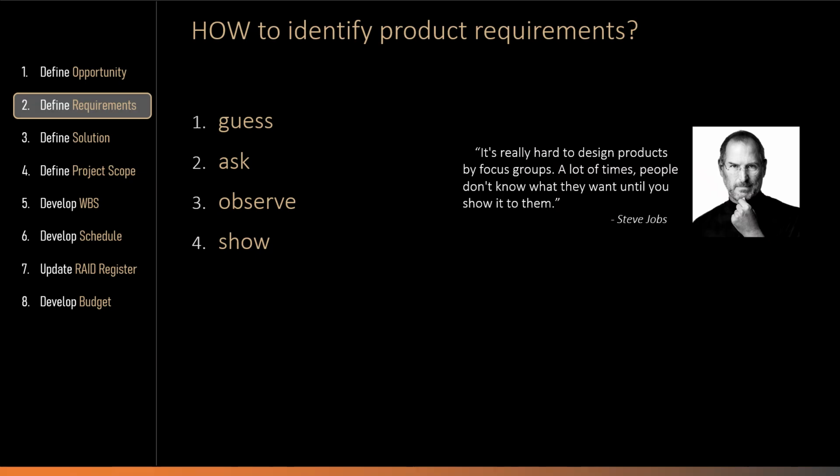The most reliable way of collecting true requirements is observation and demonstration. This means observing what people actually do and how they do it, as well as demonstrating solution or product prototypes and collecting feedback. Of course, this takes more time and effort than a standard interview. However, it often reveals needs, constraints, and expectations that stakeholders may not mention or may not even be aware of during normal conversation. The key message is this: requirements must be discovered and validated, not guessed. We do that by interviewing stakeholders, observing their actual behavior, and using prototypes to gather their feedback and to test our assumptions.